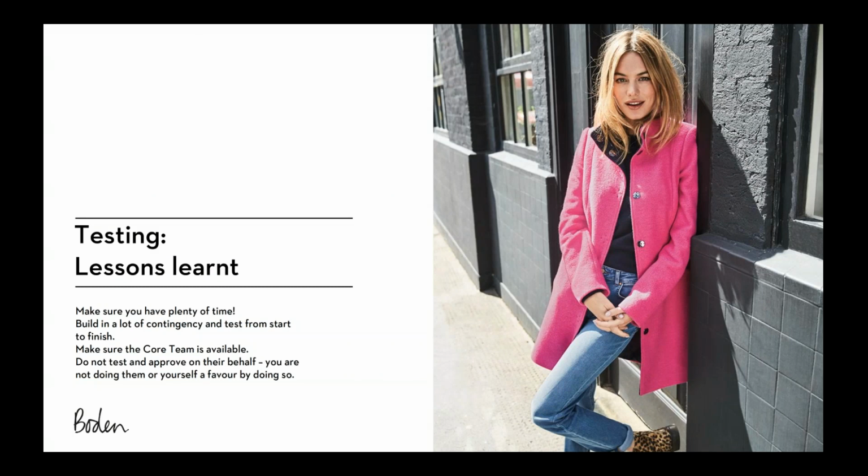So I would stress to allow plenty of time for this, build in some contingency, and really test every single bit from start to finish, and make sure the core team I was referring to earlier is testing as well, because you might think you know what they're expecting, test it for them, but you'll find that they need to see what it looks like and make sure it works for them.